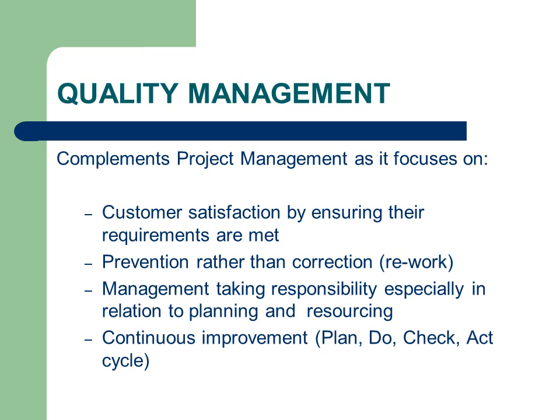It supports the appropriate planning and resourcing of the project to ensure that enough people and enough time are built into the schedule for quality activities. Finally, it supports continual improvement through a constant review and improvement cycle. That cycle is plan for quality, do the work, check the quality, and act by improving quality processes.